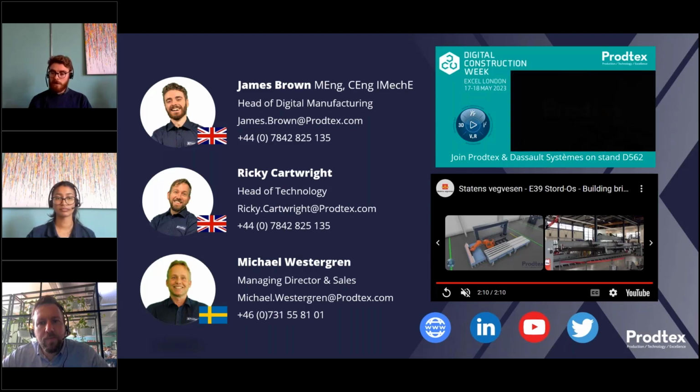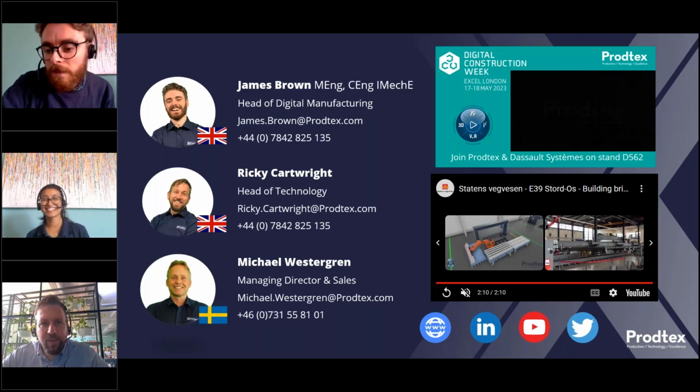So you always need to check that against the real equipment you're going to use. Is the real equipment you're using slightly faster or slightly slower because of certain reasons? In which case, let's change our simulation times to match that. And we increase our know-how, increase our knowledge, and basically validate it. So yeah, hopefully answers that. Do you have any extra points, Mary? Or no? Cool. Great, fantastic.